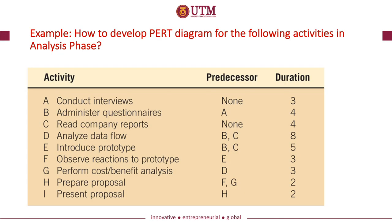Now, how do we develop a PERT diagram given such information as presented in the slide? The table shows the detailed activities planned for the analysis phase of one IS project development. There are nine activities identified as A through I. The predecessor for each activity is also identified in the table. For example, to begin activity B, activity A must be completed. To begin activity D, activities B and C must both be completed.